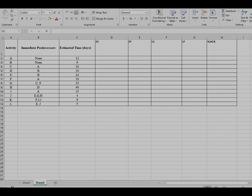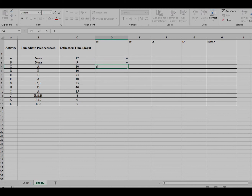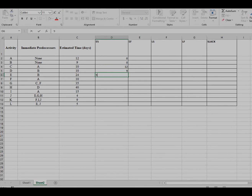Beginning with early start, we calculate the early start for activity A to activity L. The early start for activity A is 0, activity B is 0, the early start for activity C is 12 because it depends on activity A. Activity D is 9, and activity E is also 9 because both depend on activity B.